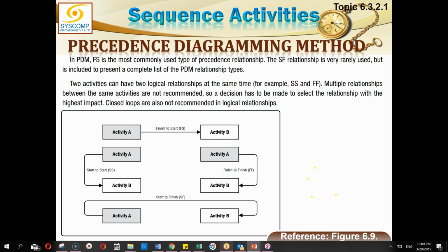For example, as you said, if you're not constructing the wall, what could the other thing be? Maybe, as you said, there are ready-made walls. So ready-made walls can start getting constructed while the foundation is being constructed. As soon as the foundation starts getting constructed, work on the ready-made wall can start. In start to start we don't have any restriction on when the wall is to finish, it is only the matter of starting. So probably we can start together and say A takes 3 days and B takes 5 days. If we can somehow start them together, how much time will both of these activities take?